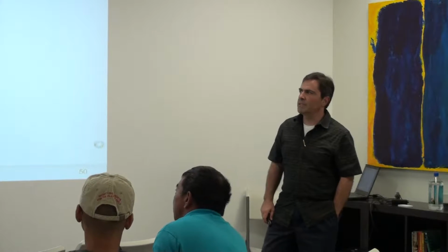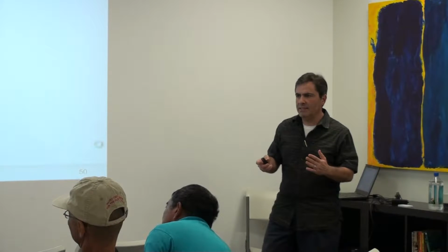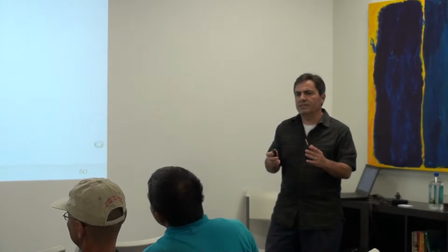By the way, how many working days is 2 weeks? It's a range between 8 and 14. But it actually turns out that it's closer to 8, because the first day and the last day of a sprint is a lot of planning and a lot of demoing, a lot of tidying up. So you really have 8 days of real development. So you could really shove in a lot of work on someone's plate, and they only have 8 days.